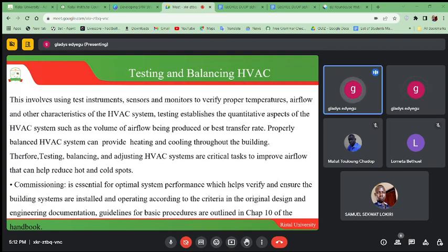And in the time of commissioning, they are going to look at how you have installed. Did you look at the guidelines on how you're supposed to install that machine or that equipment? Did you have all the documents that guaranteed that this equipment is going to be installed in your facility, so that they can allow you to use it? And when you use it, you know that everything is done in the right way, so that you don't cause accidents, you don't cause problems to your facility and also to your patients, including your health providers.